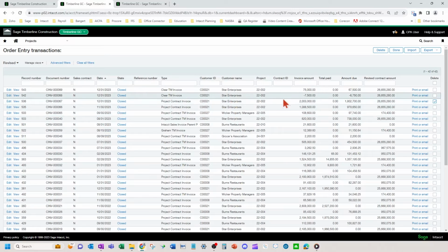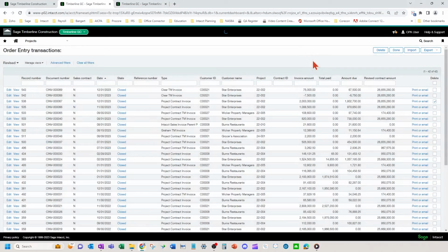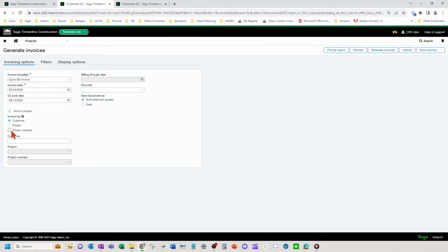If you've invoiced it, they've paid it, or you can't delete it, maybe your accounting period is closed, and you want to do a negative adjustment through a correction invoice, then you need to do a generate invoice progress bill as a negative. Okay, so we're going to go here. We're just going to run the normal process.